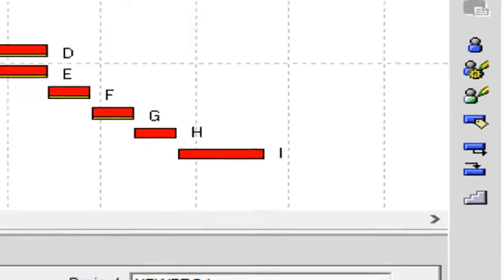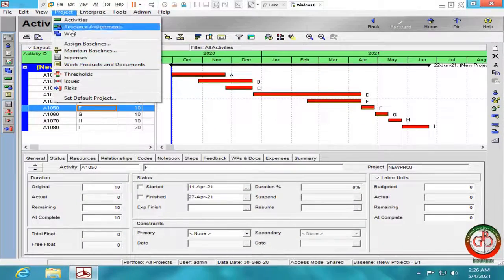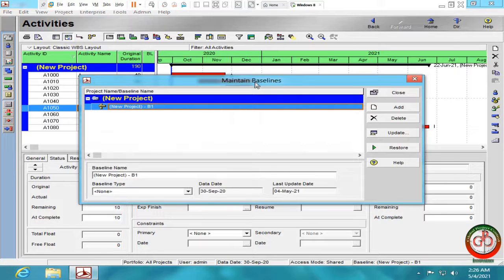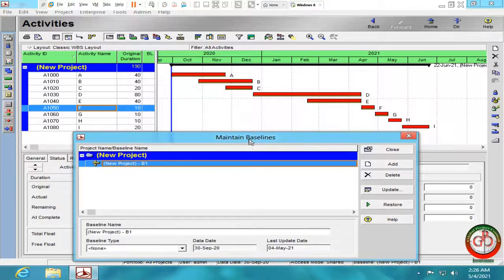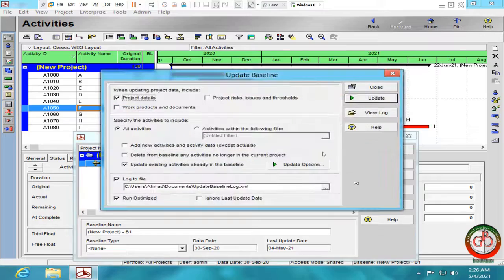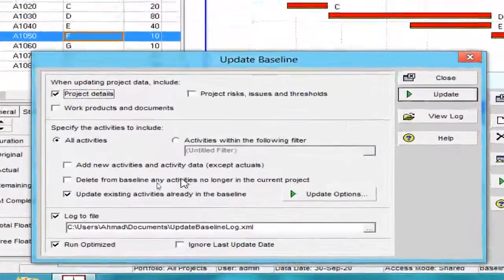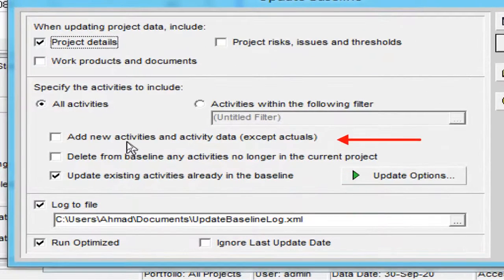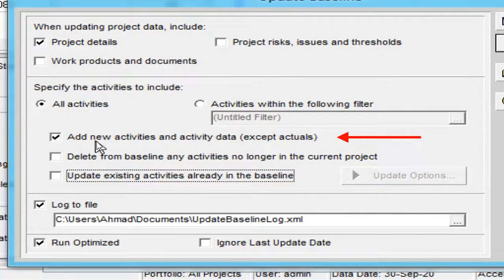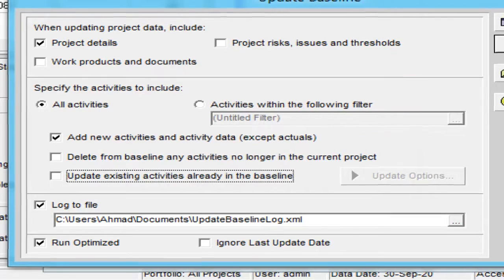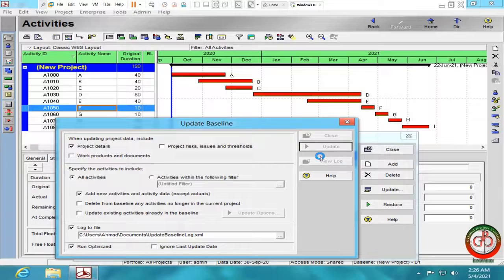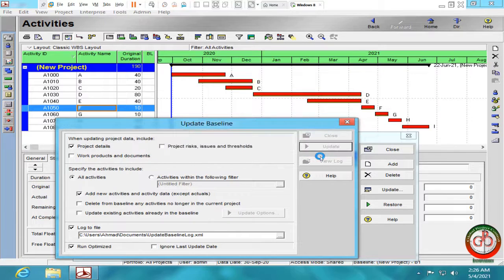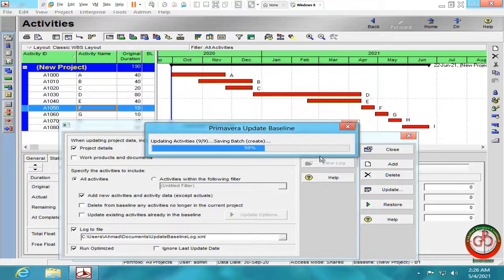By project, maintain baseline, you should select the update, then select this option. Add new activity and activity data except actual to the baseline. And do the update. Wait for a moment for the software to add these two activities to the baseline.